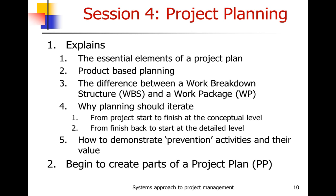Session 4 goes into planning in more detail. It explains the elements of a project plan, discusses product-based planning as opposed to activity-based planning, the difference between a work breakdown structure (traditionally used as a planning tool, though it should not be) and a work package, and why planning should iterate from start to finish at the conceptual level but from finish back to start at the detailed level. It also covers how to demonstrate the value of prevention in your plan, and in this session you actually begin to create parts of a project plan.